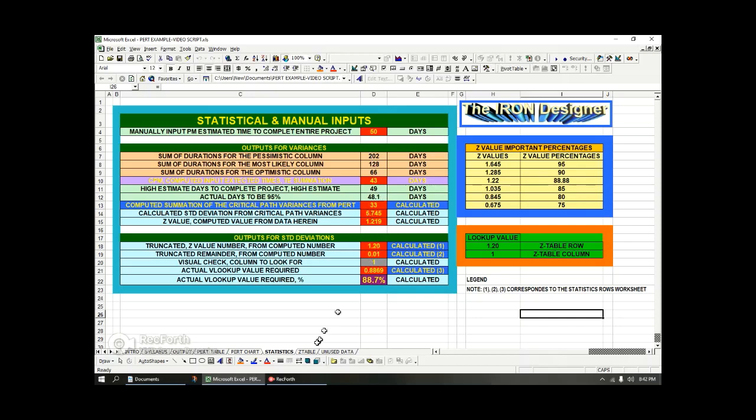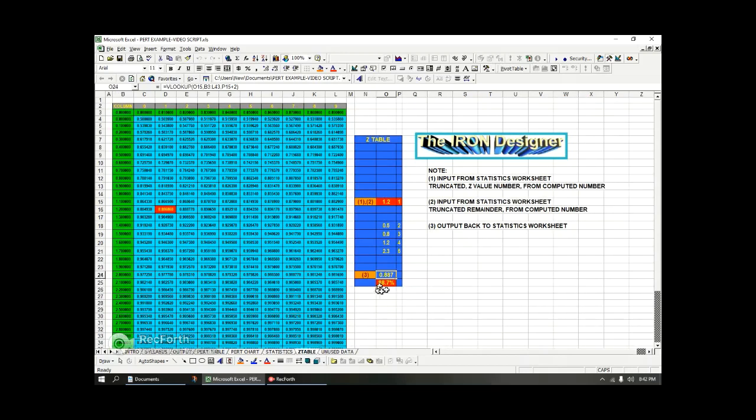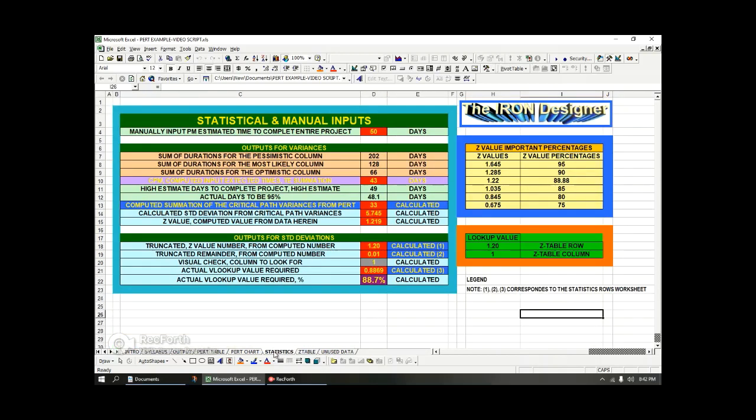and this is going to be the input that ultimately leads us to the 88%, okay? And we tell them the critical path is 43. The CPM computed input expected times summation was 43 days. He says, good, just give me another week of padding. I'll get it done in 50 days.